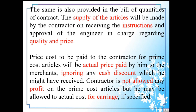As approval or instruction is received from the site engineer or engineer in charge, the actual price of the prime cost article is given to the contractor. Whatever cash discount the merchant gives to the contractor, that amount can be received by the contractor, but no profit is allowed on these items apart from the cash discount. However, whatever expenditure is incurred to transport the article must be paid by the government or owner if specified in the contract.